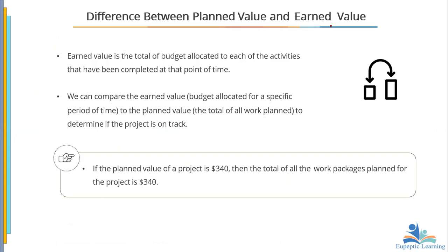What's the difference between planned value and end value? We planned that we're going to do this, it was going to cost us that. But at the moment, the reality on the ground is that this is how much it's going to cost us. Let me give you a typical example. You are at the foundation stage, you planned that the foundation was going to cost this amount because of the duration. Then the workers or the labor start digging. Remember, you scheduled that it was going to take, let's say, 1 week. Within 1 week, you're going to charge the labor, you pay for the labor, is that not? Maybe they have their daily or hourly rate. So you're going to multiply that by the duration that you're going to do the project. Then this is what happens.